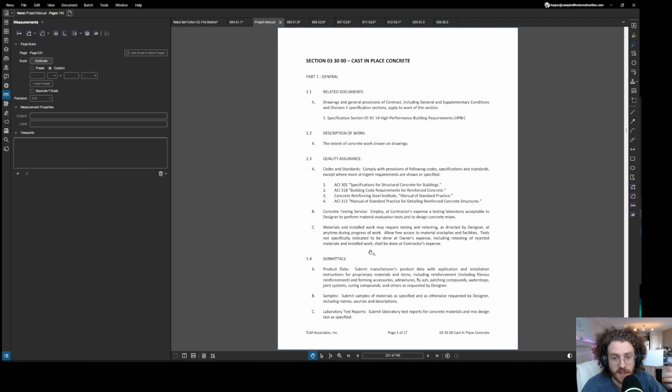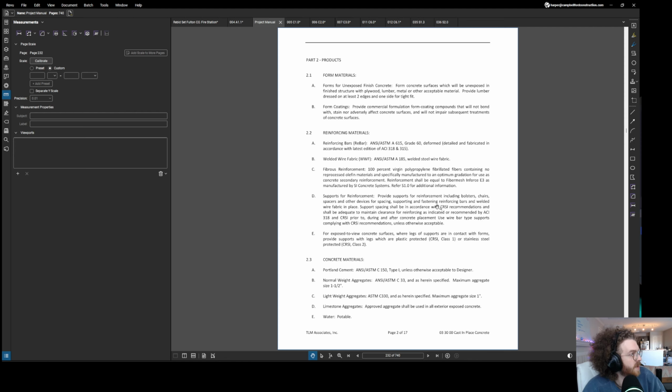That's called a submittal. That's when the architect approves the specific concrete that you say, "Hey, we're installing this kind of concrete on the project. Hope that's good, Mr. Architect." I was doing a thumbs up. And then they either say, "Yes, approved, go ahead," or they say, "No, that sucks. Give us something else. We don't like that." Which that one happens sometimes.